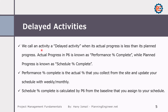We can call an activity a delayed activity when its actual progress is less than its planned progress. Actual progress in P6 is known as performance percentage completed, while planned progress is known as schedule percentage completed. Performance percentage completed is the actual percentage that you collect from the site and update your schedule on a weekly or monthly basis. Schedule percentage completed is calculated by P6 from the baseline that you assigned to your schedule.